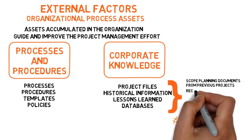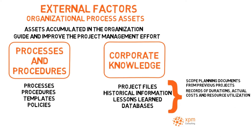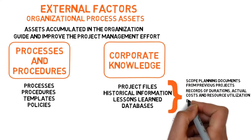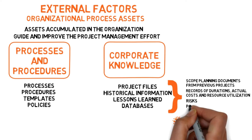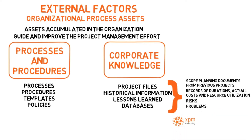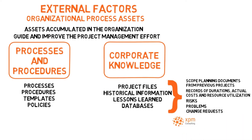Historical data also includes records of durations, actual costs, and resource utilization; descriptions of the risks and the effectiveness of the adopted risk responses; problems and their resolutions; and change requests.